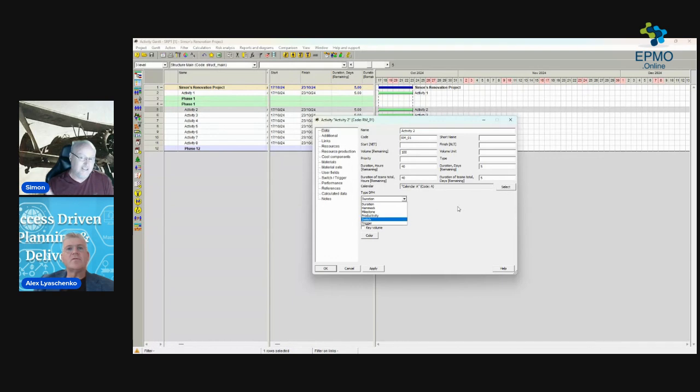But I like the idea of productivity. That's very straightforward. Productivity is probably the most used type in Spider. Because normally, if you want activity duration to be calculated, it cannot be a predefined duration. So you try to measure this as a certain volume, which is represented by these activities. And volume could be whatever units. It could be pages, as we discussed last time.